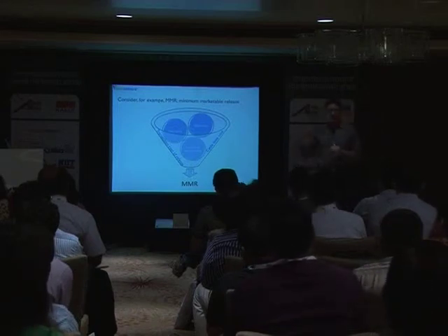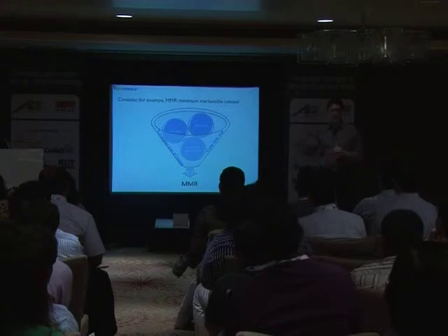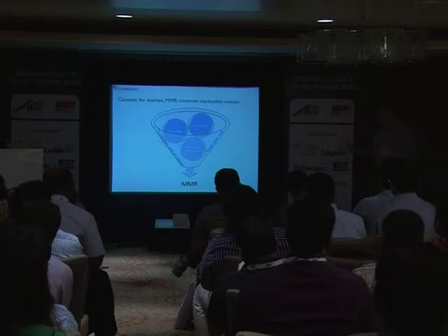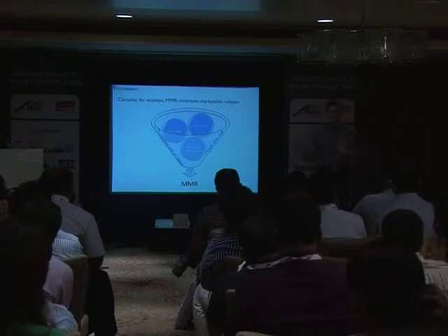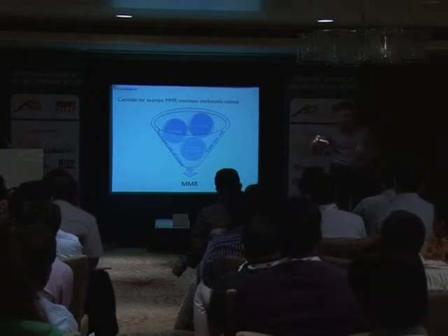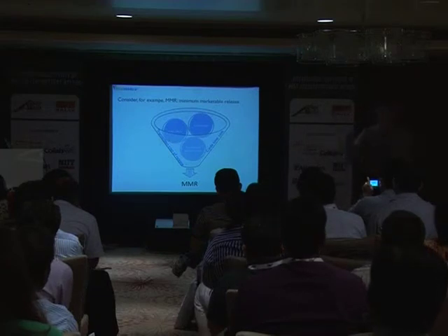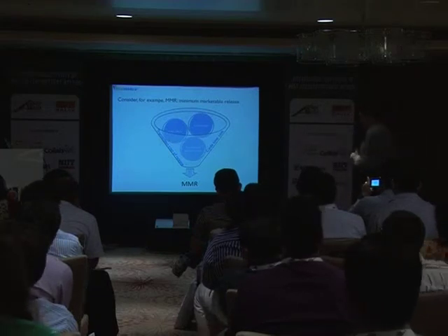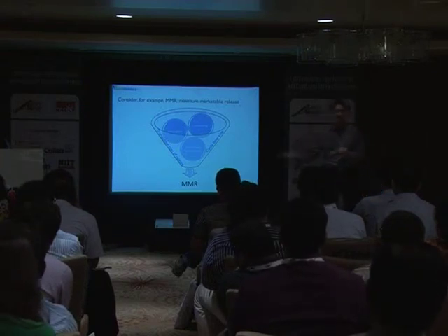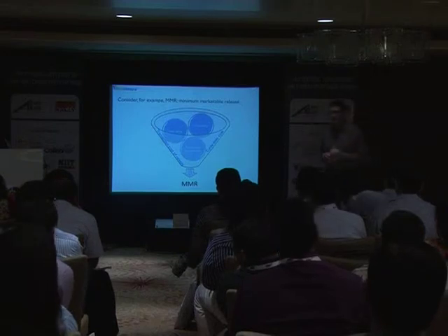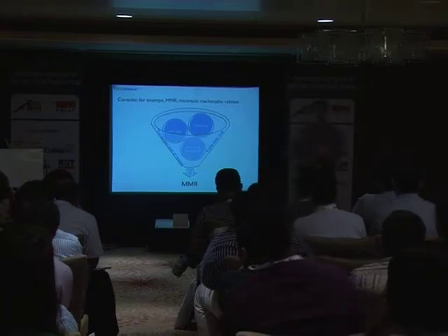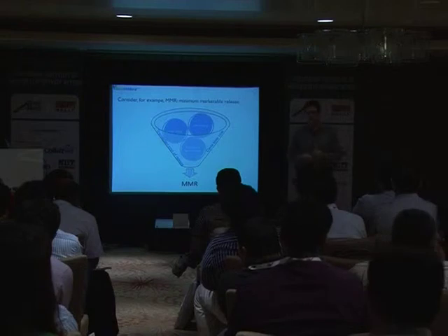we have to consider always the economic factor. So what are the economic reasons behind the Agile methodology? What are the economic reasons behind an approach like Kanban? What are the economic reasons behind wanting to decouple? So we're used to saying, I finish a sprint and I deliver. And over time it became accepted that we can actually do a different kind of delivery that has an economic reason, which is my MMFs, my minimal marketable features. Well, another economic reason could drive us to do an MMR. MMR is minimal marketable release.